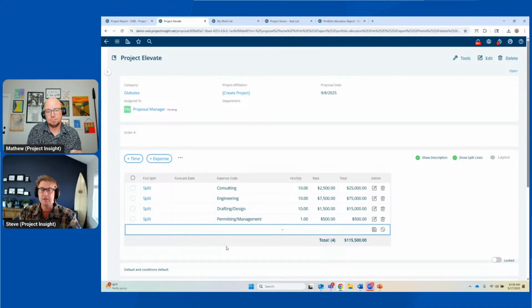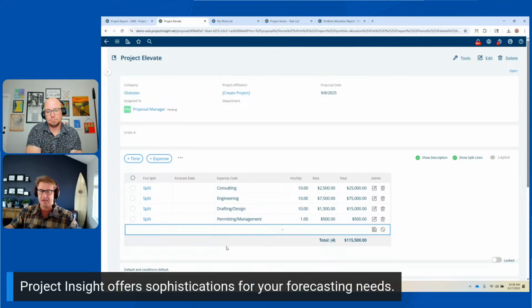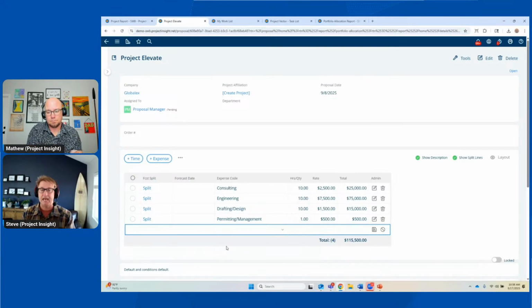So with this tool, the PM can just get the order, look at it, put the forecasts in, and in our system, it'll automatically amortize the values in the correct months in the reporting for you, and compare that with your scheduled amortization as well as your actual time entries when they happen too. So you're now automatically getting that data added to those spreadsheets that you would have to do manually. They're automatic. That's right.